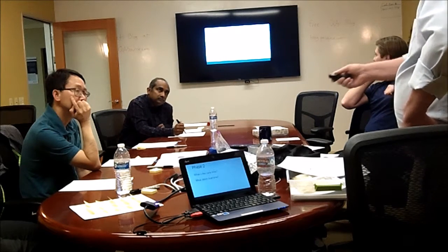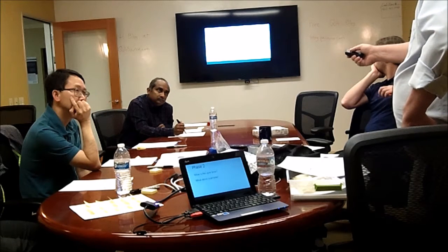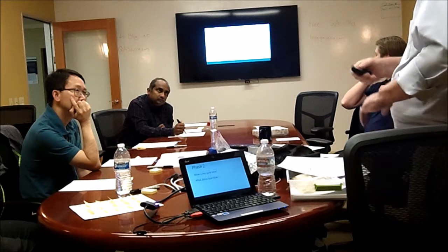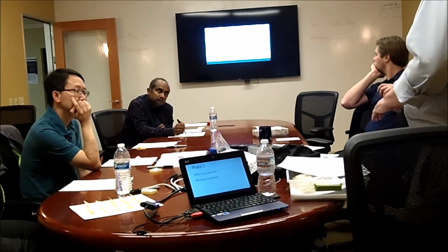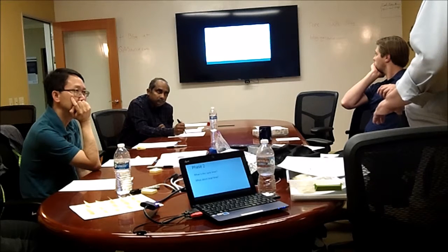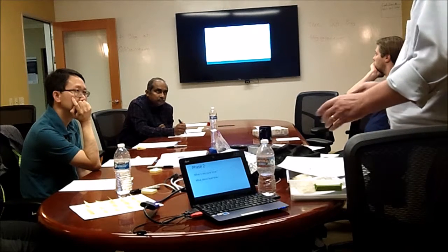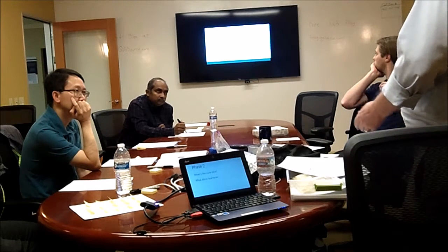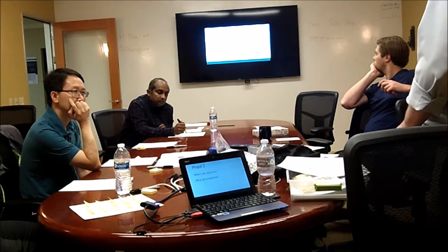You've got a pile-up coming here, and you put something in the system here. Some things make it through, and some things take longer. For each successive unit, it's going to take longer for it to get through. And if that becomes greater than the rate at which you can clear them, then you have the situation we were just talking about. But we can calculate the lead time.